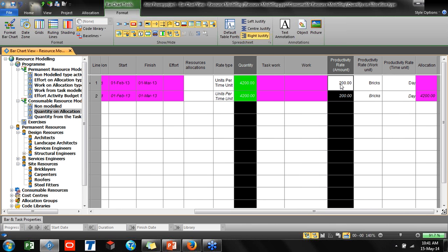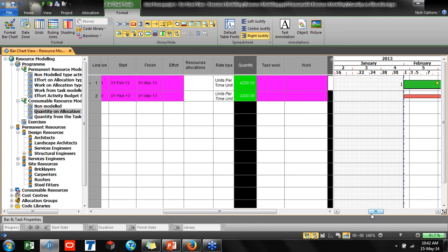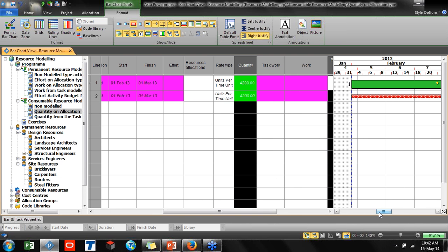Generally, we are managing the time, so we will have realistic duration. If you would like to manage the resource numbers and capacity, you will be changing the modeling type at the beginning, and it will be directly calculating for you how many resources will be required. And we have more samples. Do you have any questions for the modeling? Till now, maybe you just assigned on the task, but here we have more settings which you can use in your projects.